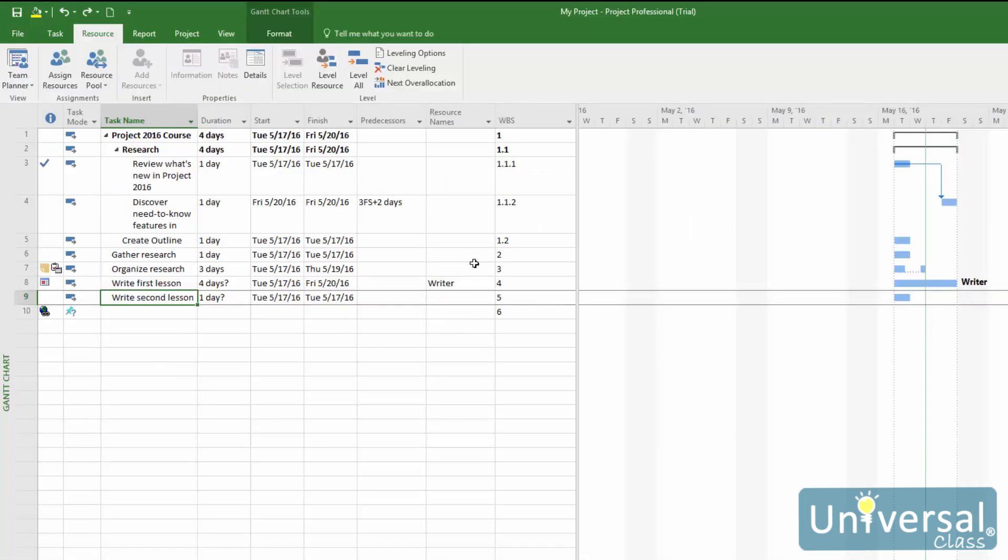When you want to track the progress on your project, it is important to first enter a status date. Project will, by default, use the time and date settings on your computer. However, let's say that you want to track the project status through the last day of the month—then enter that date. You can also use the update tasks feature because you can mark tasks complete up until that date.